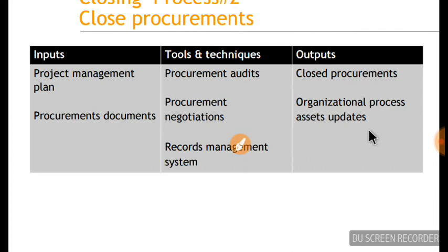So very often in projects, even after the project gets over, the engineering team may be dismantled, but the procurement team may continue because it will take more time to close the procurements, primarily because of procurement negotiations and litigations.